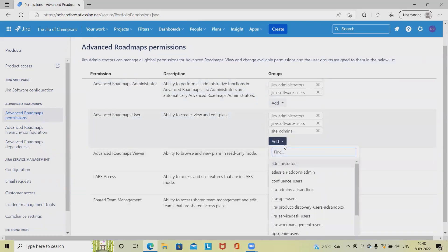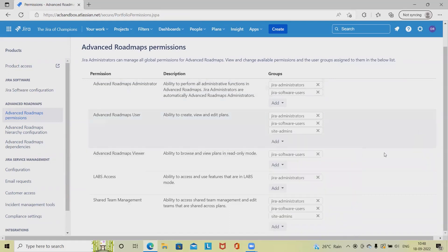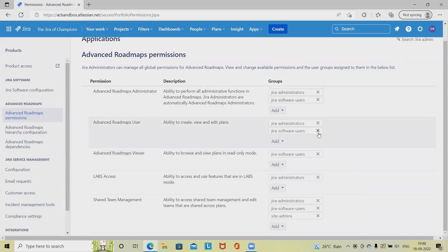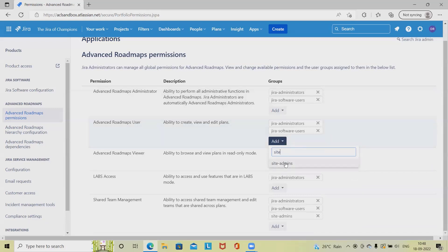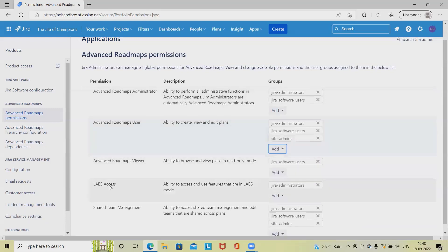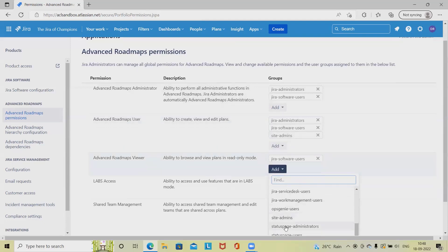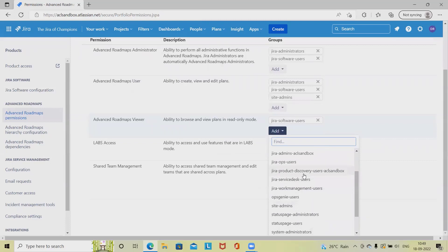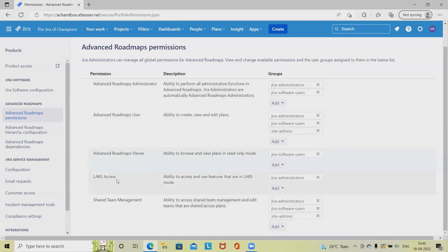The advanced roadmap user permission applies to create, view, and edit the plan. We can add any number of users. If we want to delete someone, we can simply click on the cross tab. We can also add the advanced roadmap viewer role, which gives the ability to browse and view plans in read-only mode — users in this group can only view and cannot modify or edit.